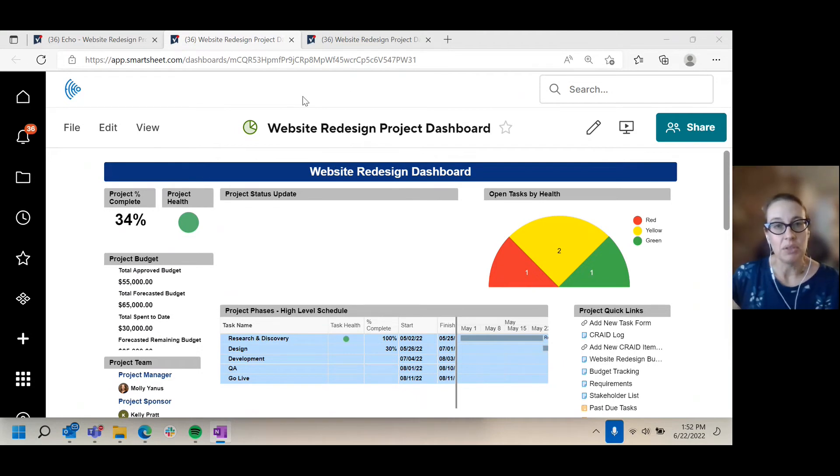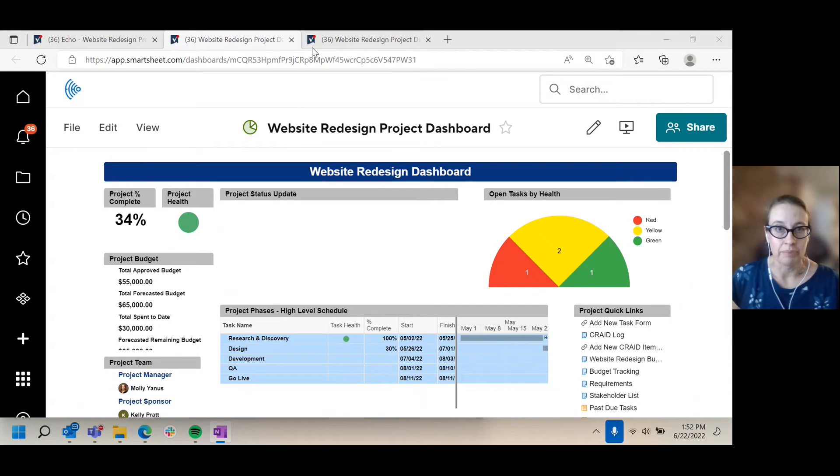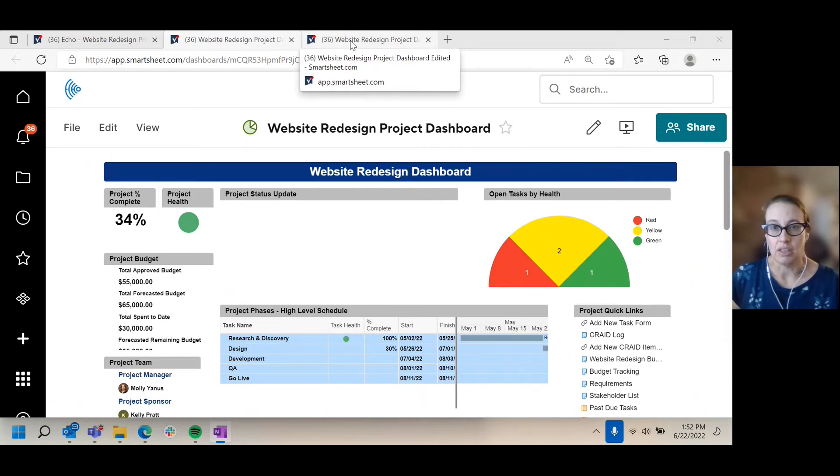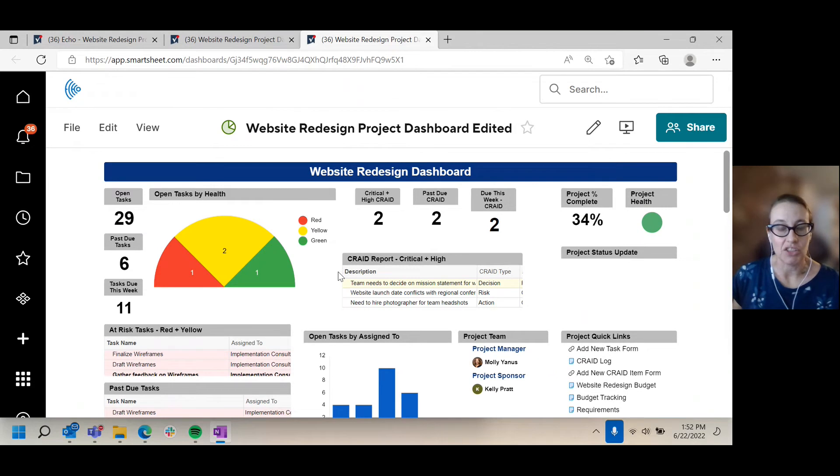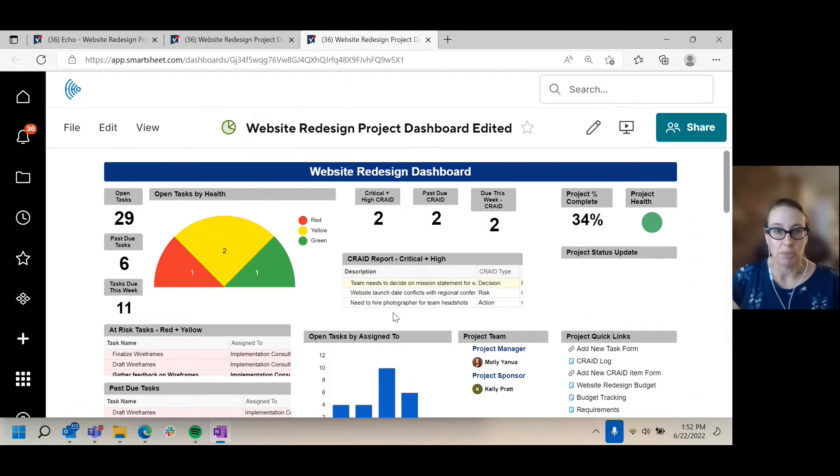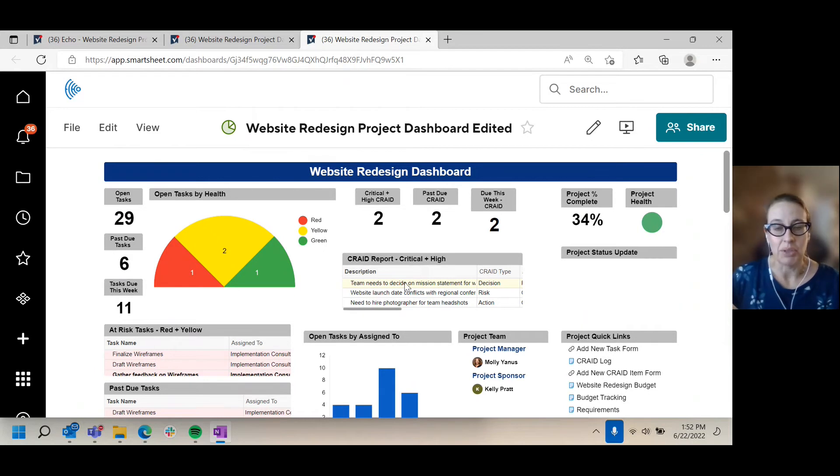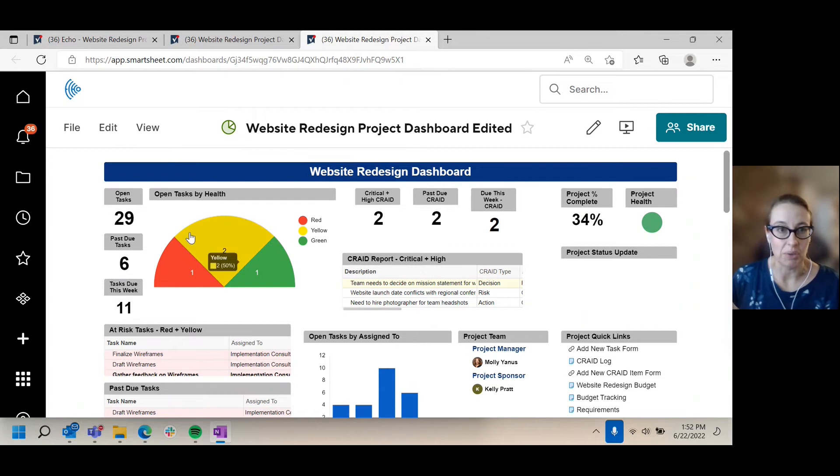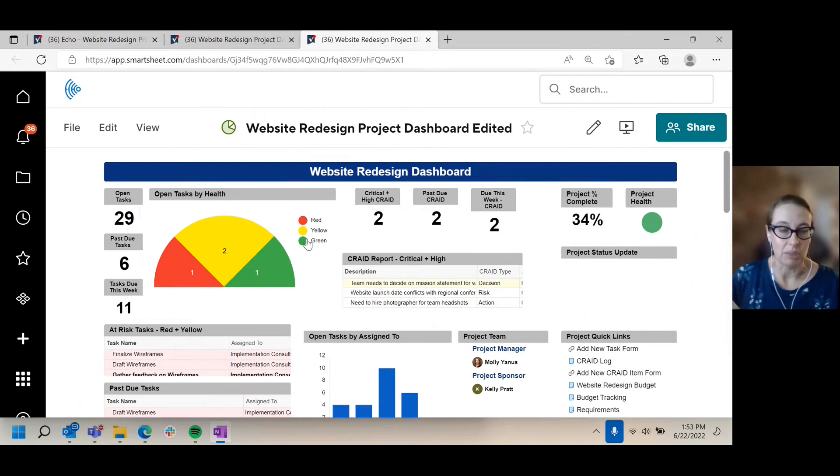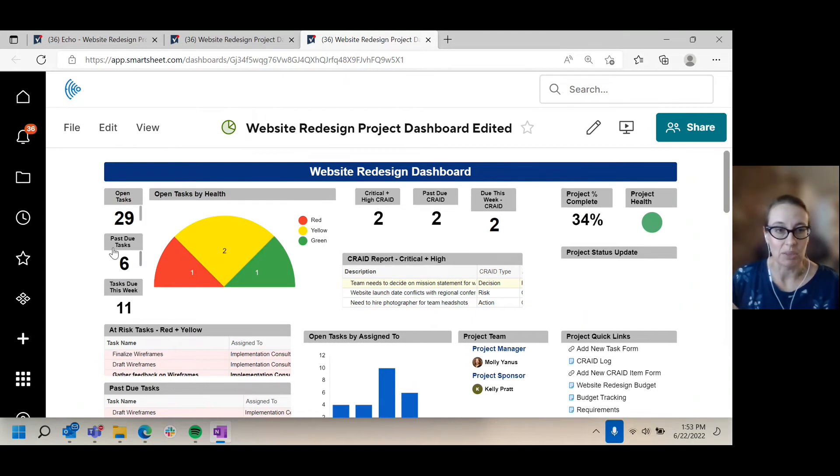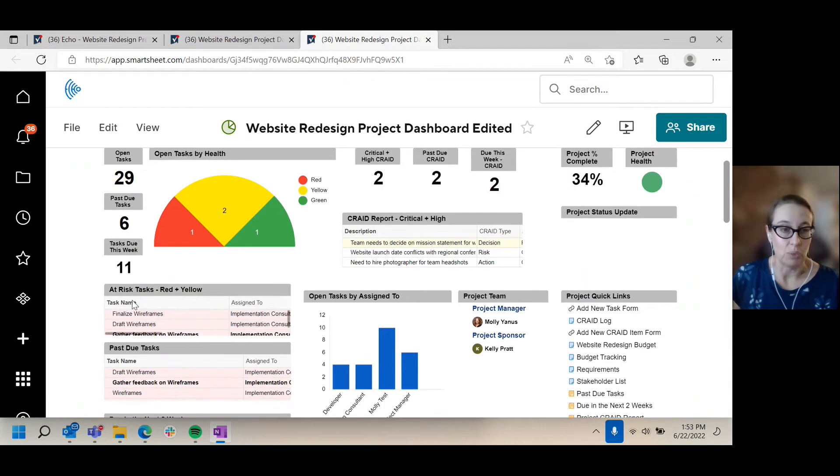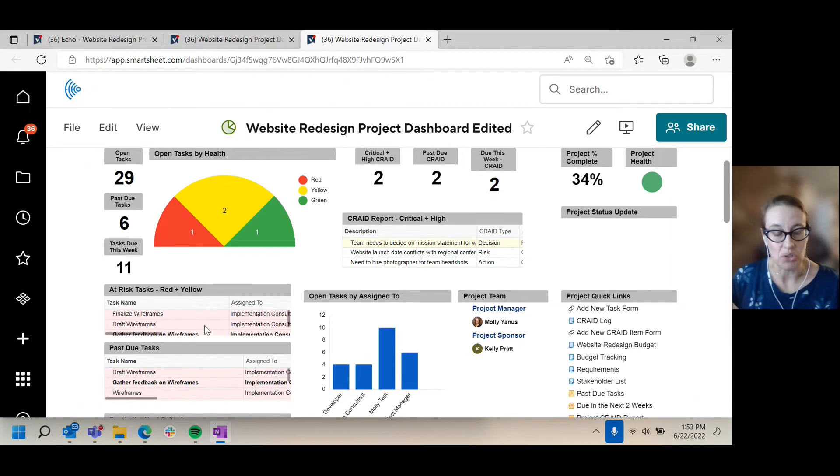So a few tips for making this dashboard more actionable. I'm going to switch over to a draft redesign, and you can see I actually kept exactly the same visuals and graphics and did a little bit of rearrangement. We like to talk about putting the most important actionable things above the fold. So right where your eyes are here at the top, we've got open tasks by health. You can immediately see how your tasks are doing as well as important metrics on those tasks, and the callout of what those specific tasks actually are that are at risk and past due.